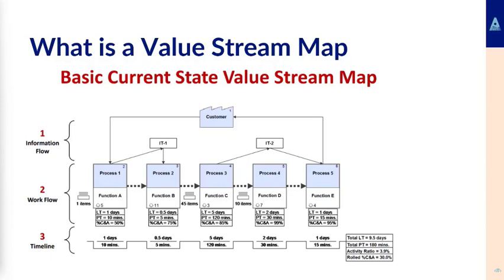So you have a time for doing the work, but actually how long does it take you to process that? So we can see down here it has 1 day for process one, but actually takes only 10 minutes as part of that processing time, but the lead time is 1 day, and that adds up, so you can have your ratio here.